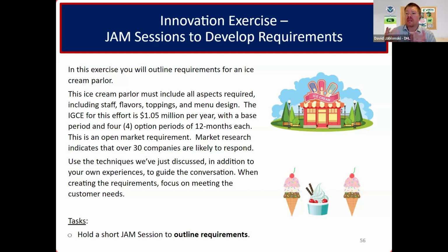All those things can be done in a second phase rather than just doing what we call a single phase procurement, where you put it all out there, ask all vendors to submit back, and then you have to evaluate loads of paperwork and lots of massive information from a big vendor pool. That slows down the process, and it costs a lot of money to vendors, which you should be very much aware of. We have a video on that on our Pillcast channel, so you can check that out.